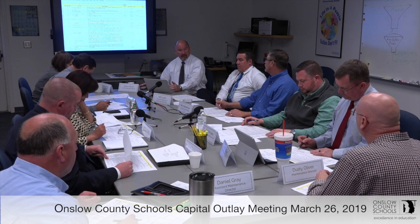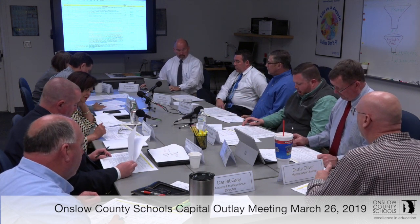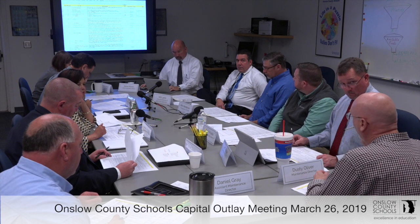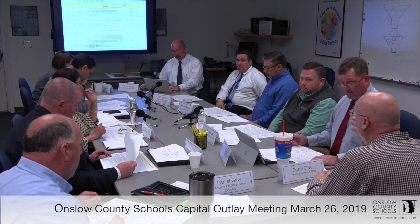Is it an immediate need or something that needs to be done in the next couple of years? They're running right at the moment. That's one of the places where we probably need to change them out, and this process lets us hopefully do it during the summer when no one's there. If it fails during the winter, then we have classrooms that are not heated.